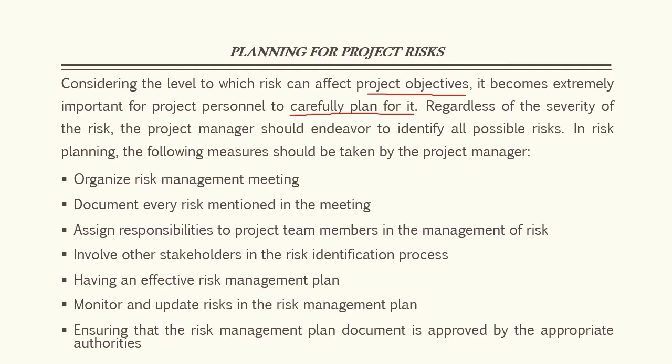Regardless of how severe the risk is, every possible risk must be identified, because there are times you might notice that a particular risk can be of no effect as at the time of identification, but as the project progresses, that risk can graduate from being a minor risk to a major risk.